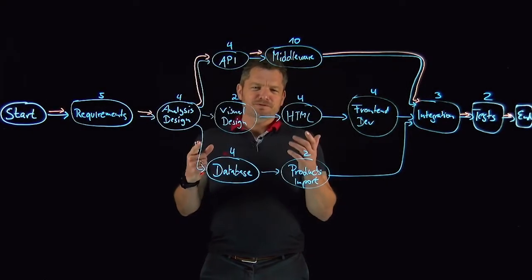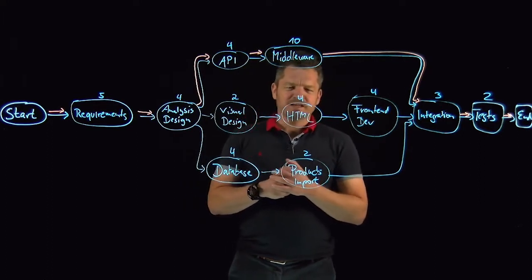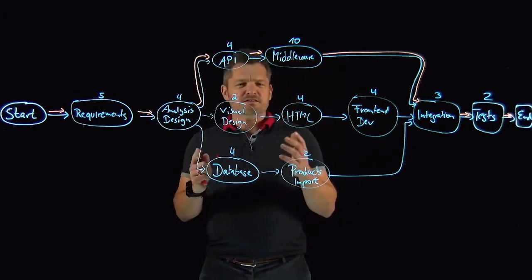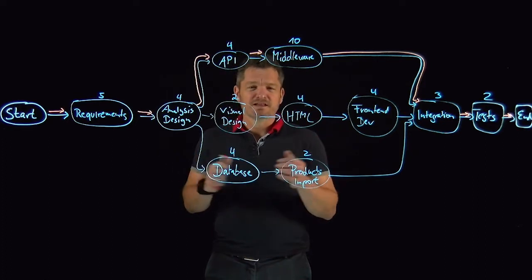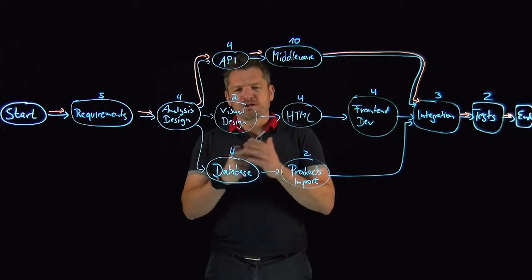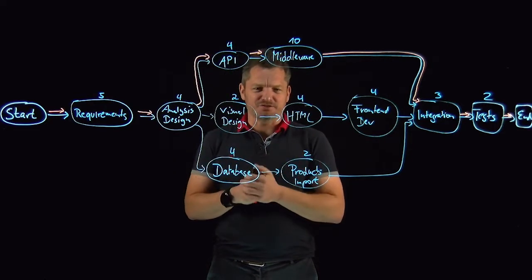Now to determine the earliest and the latest each activity can start and the earliest and the latest each activity can end, you need to do a forward, so-called forward pass calculation.